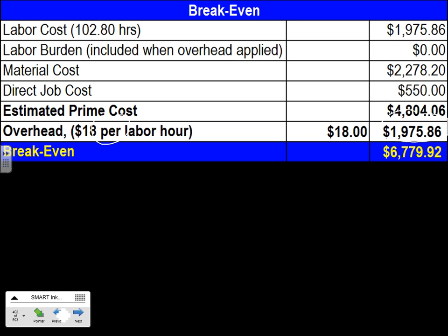And then you add your overhead to it, and you got yourself the beautiful term of break-even cost. Break-even cost is how much it will cost you to do this project. So what's the bid price? The bid price is how much you are willing to sell this project to the customers. And that, gentlemen, will be in chapter 6. We'll talk about the profit. We add a little bit of profit on it, and that will get me the selling price for this project.